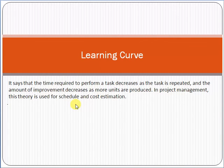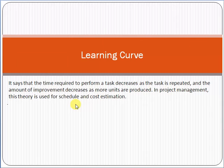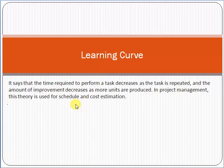It basically says that the time required to perform a task decreases as the task is repeated. For example, if your responsibility was to write a scope document, the first time you wrote it, it was very difficult. But after writing 50 scope documents, it becomes a very routine thing for you and you can easily write it. So as soon as the task is repeated, the time required to perform it also decreases.